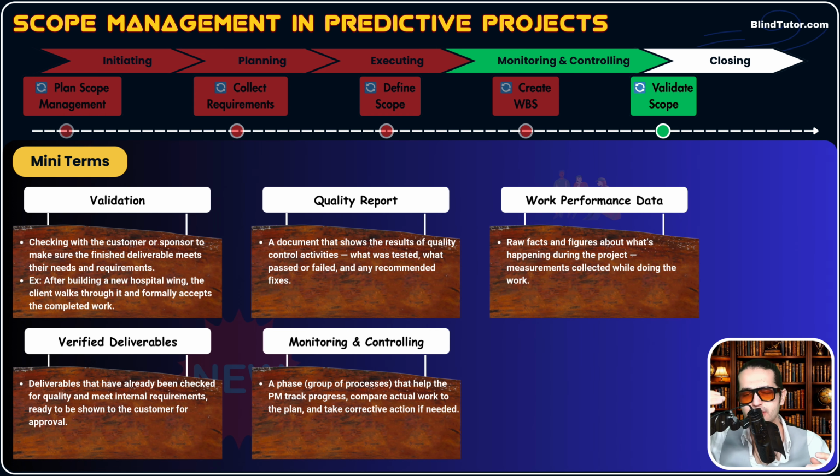In the planning phase, guys, we plan for all those 9+1 pieces, but we know that there are surprises in projects, and projects do not move exactly as our plan. There will be some deviations. As a PM, you compare actual data, actual work, to the planned work. Where? In the monitoring and controlling phase, not in the planning phase.